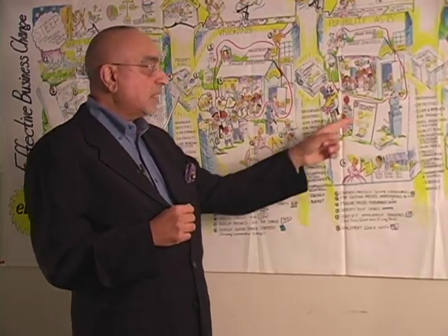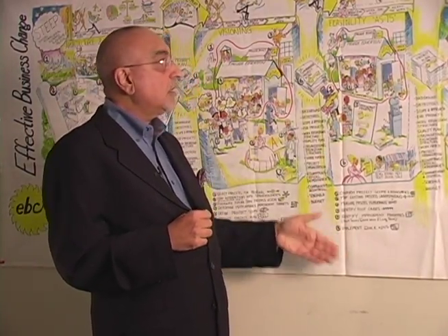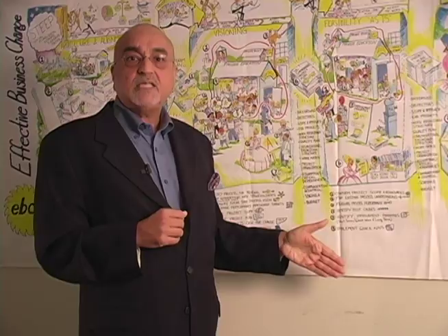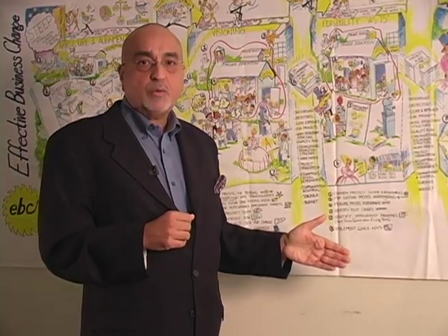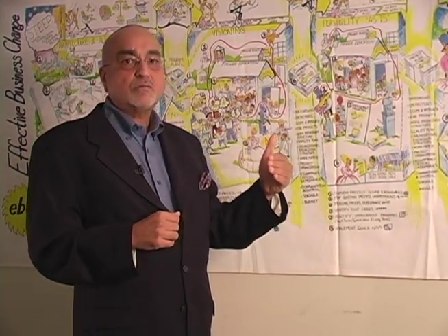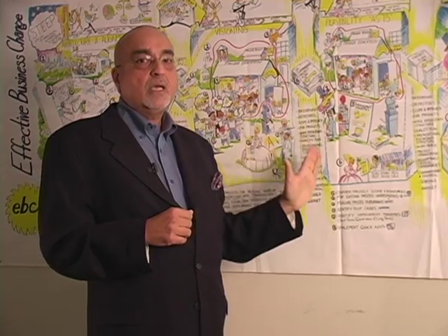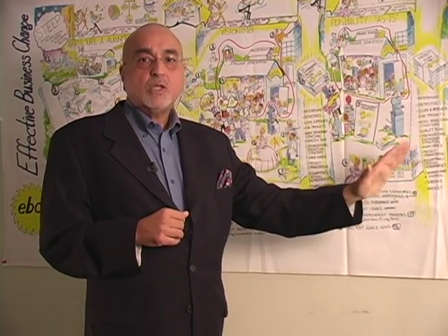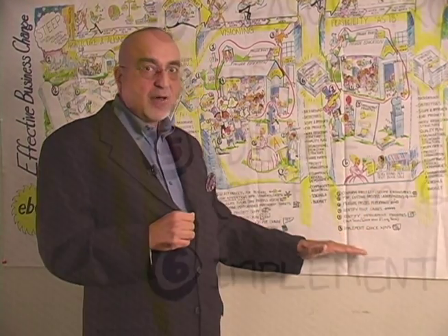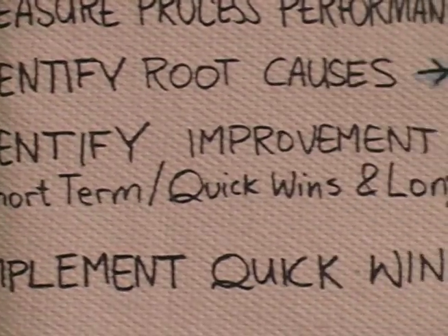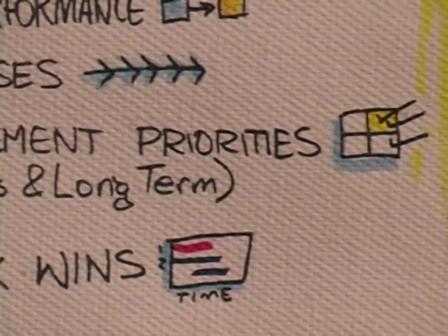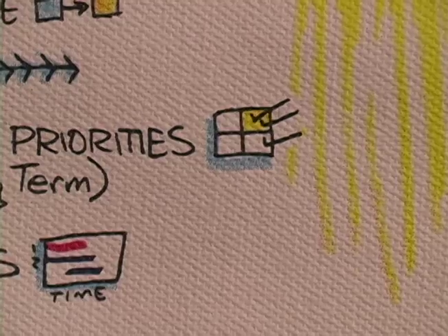But obviously these are not quick wins. So the decision here in the feasibility as-is is made: what is a quick win and what is long-term, short-term changes that need to be dealt with in the next phase down. But the quick wins are identified at this stage, and they are actioned as projects. Somebody is assigned to go and implement these quick wins.